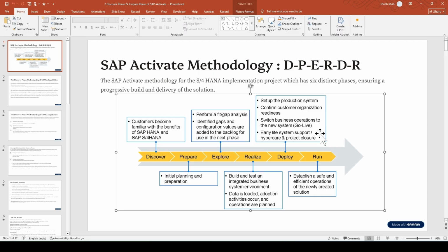Once you have completed integration testing, unit testing, and user acceptance testing, the go live date will be planned. Before the go live date, companies nowadays prepare a pre-production client and do mock-up rehearsals.